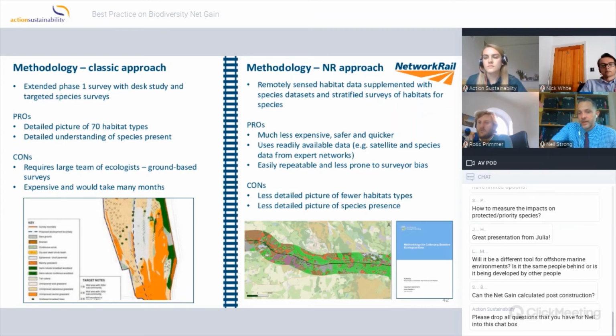We are looking at particular methodologies, and as I say, we're working with CEH to remotely survey the rail network, those 52,000 hectares, so that we can do this safely. We can do it without having people in the vicinity of trains, and then we will take people onto the ground to ground truth that data, so that we can make sure that the information we're getting enables the managers to understand and to start programming works.